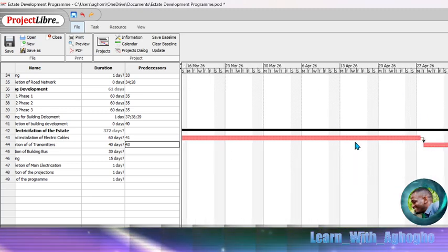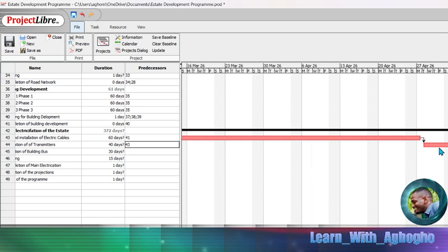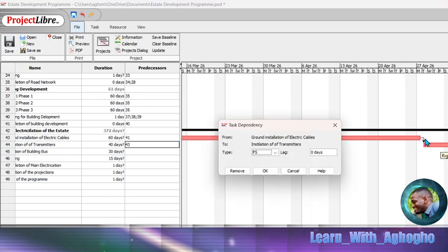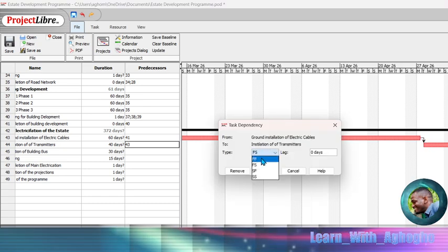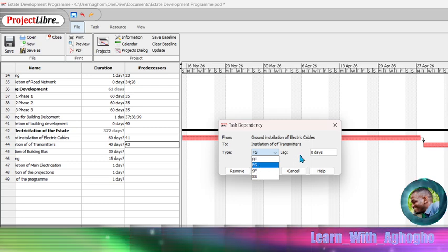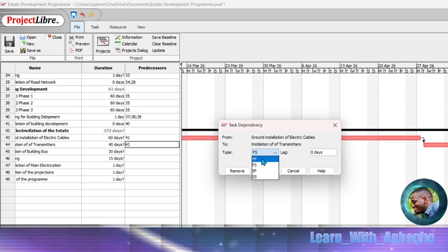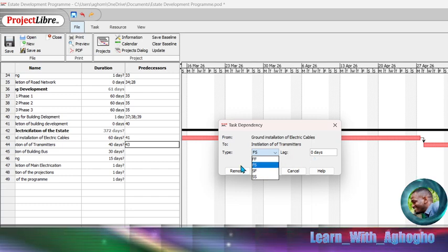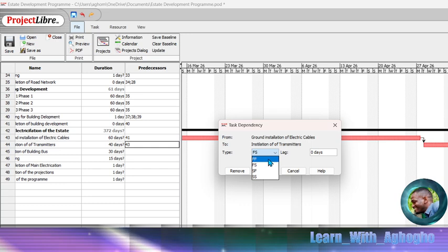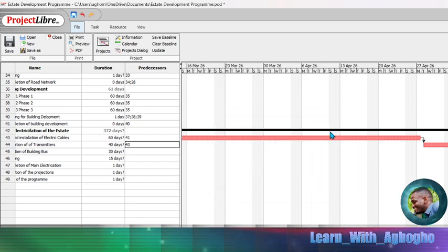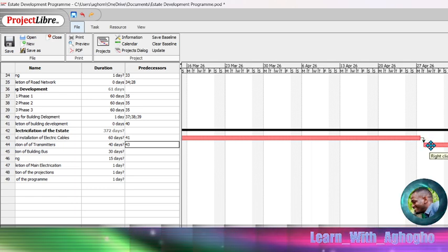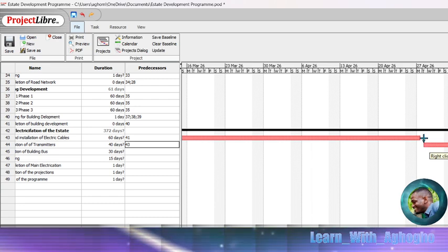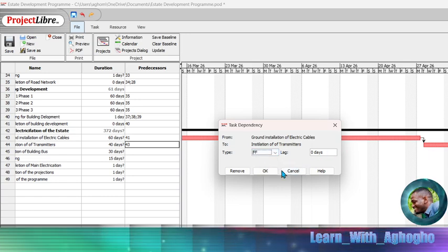So you have start to finish, but you don't want that. You have finish to start. You don't want that. So you want finish to finish, you click here, say OK.